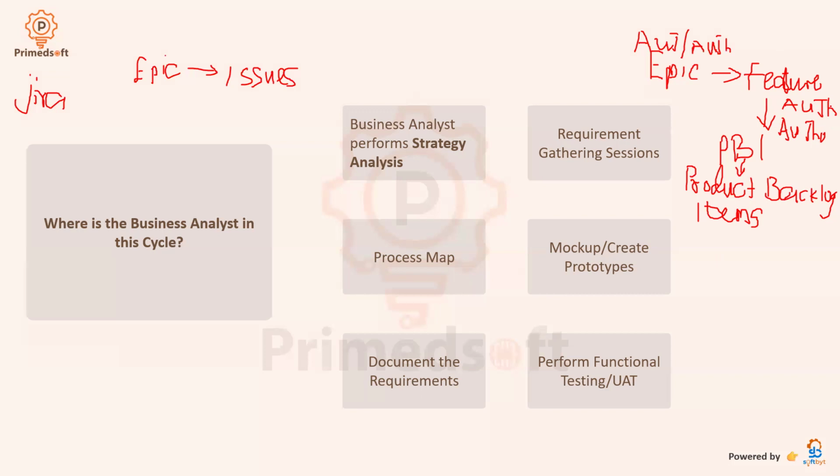Now when you're done with that, you can pick the first one, authentication, and break it down to things like login, because that's authentication, logout, forgot password, or reset password.